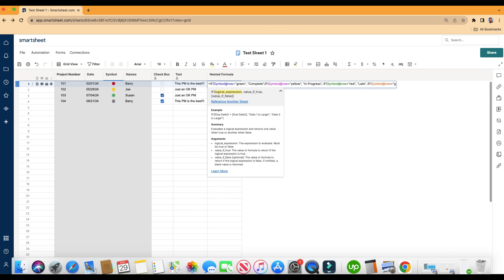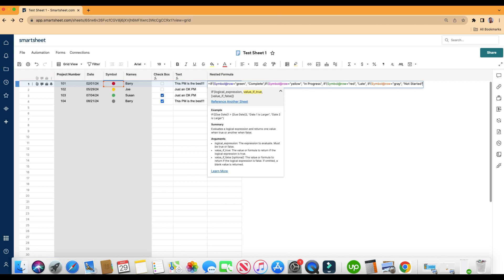If symbol at row equals gray. Just so you know, heads up, Smartsheet says that gray is spelled G-R-A-Y. So if you're doing this formula, and you put in G-R-E-Y, and you're like, hey, how come this isn't working? It's because it doesn't think that gray is spelled with an E, it thinks it's spelled with an A. If it's true, then we're going to say, in quotation, not started. And if it's false, we'll just do an open and close quotations, which means the cell will be blank. So that's the formula.